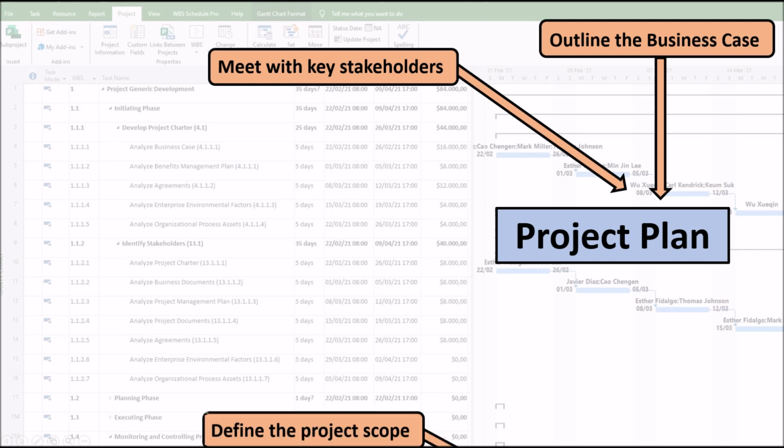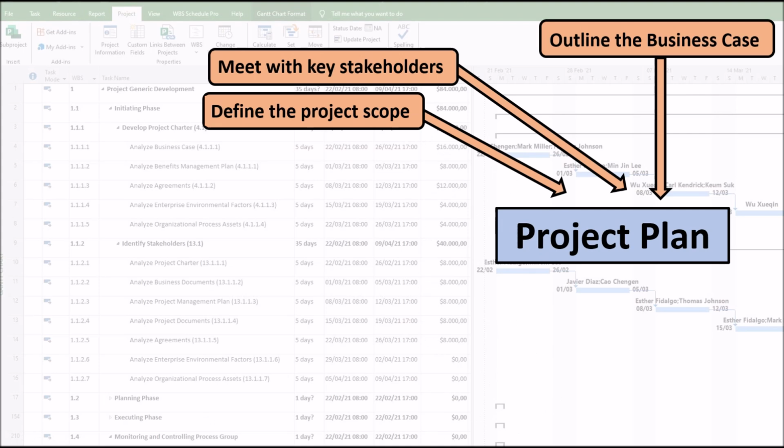3. Define the project scope. The scope of a project is the clear identification of the work required to meet the project objectives and generate the necessary deliverables, that is, to complete or deliver a project successfully. The project scope must be defined and organized by a work breakdown structure, WBS. Therefore, the project scope includes what you must do on the project: deliverables, sub-deliverables, work packages, action items.